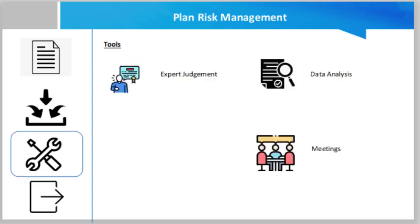The tools for this process: the first tool is expert judgment. Expert familiarity with the organization's approach to managing risk includes enterprise risk management, tailoring risk management to the specific needs of a project, and the type of risks likely to be encountered. Data analysis is another tool — data analysis techniques include stakeholder analysis to determine the risk appetite of project stakeholders.